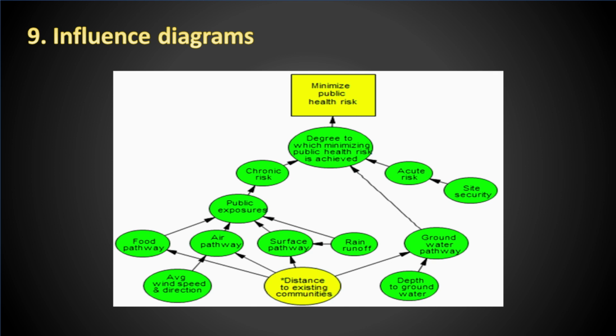Risks developed from uncertainties in the project and influence diagrams help you take better decisions in the face of uncertainty. Understanding this will give you insights into the decision-making process because you now understand which variables impact more the overall outcome of a decision. For complex scenarios, once the influence diagram is created, it can be evaluated using a simulation technique such as Monte Carlo analysis to indicate the elements that have the highest influence on outcome.